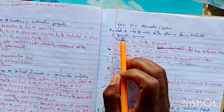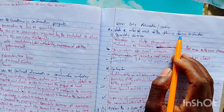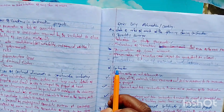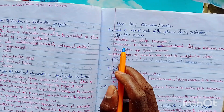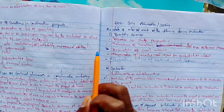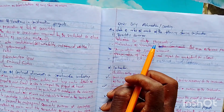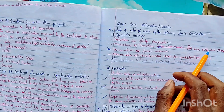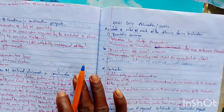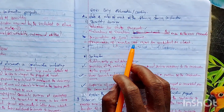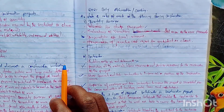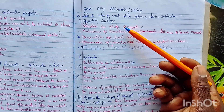The first question says: state four roles of each of the following during construction — quantity surveyor and contractor. For the quantity surveyor, the first role is valuation for stage payment, valuation for variations that arise as the work proceeds, preparation of the final account, and preparation of periodic cost reports for the architect or client.